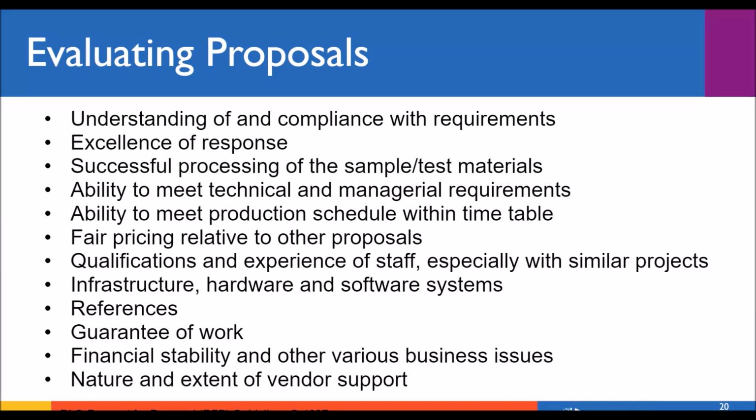Depending on the size of the project, you'll probably want to also look at the financial stability of their business. So is this a new business that may not be around by the time you send your materials to them? Or is this something that's an established business that has a lot of clients, has a lot of throughput, and is somewhere that you're going to be able to establish a relationship with over the next few years?